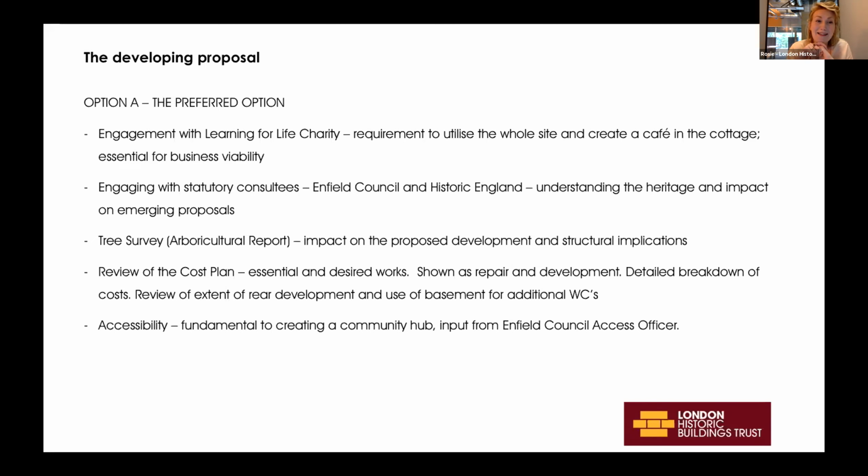And of course, fundamentally engaging with your statutory consultees and getting really early stage advice from the local authority and Historic England is absolutely valuable. So this is pre-application advice that we're seeking. And because we've brought these key stakeholders along with us on this journey from the beginning, we were able to ask them for this, I suppose, informal early stage advice on our emerging proposals.